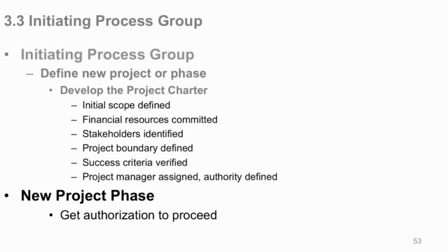You've got to be in the project charter. And it is best if the actual name is assigned in the charter. If not, it should be assigned immediately after. And if this is a phased, multi-phase project, and you deliver in the end, and you come back for the new phase, you want to review your charter, make sure it's fresh, and update it again. Progressive elaboration at play here. So you need to get another authorization to proceed with the next phase.